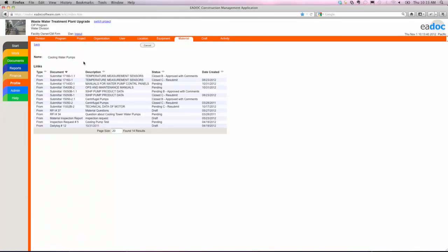It's going to be the inspections. It's going to be inspector daily reports. All the documentation and communication around these major materials is being tracked electronically throughout the design and construction phase of these projects. The main objective, the whole benefit of doing it throughout design and construction, is to turn over very accurate, very detailed information to your operations and maintenance group. You want to track all this information throughout design and construction, where all of it's being generated, to turn it over to operations and maintenance.